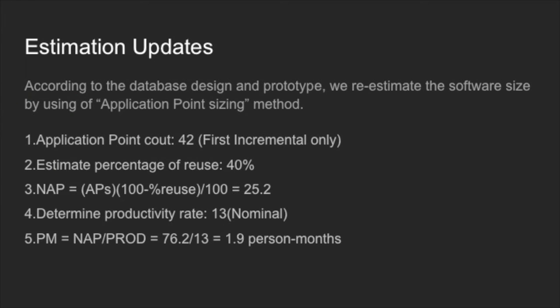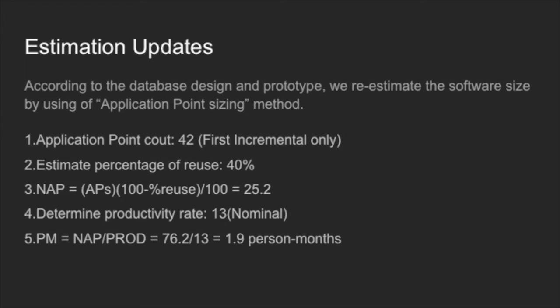For estimation, this time we will be using application point sizing method. According to the database design and prototype, we re-estimated the number of reports, screens, and 3GL components. We got the application points and estimated the percentage of reuse at about 40%. Then we chose the productivity rate at nominal level. Finally, we got the PM of 1.9 person months.